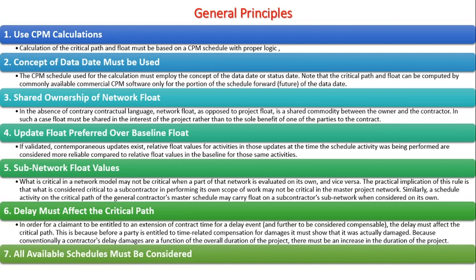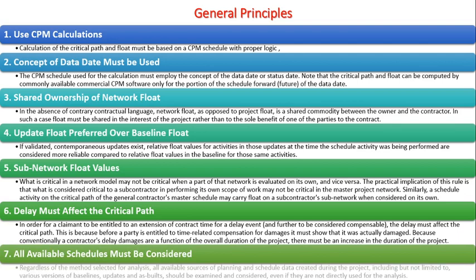7. All available schedules must be considered. Regardless of the method selected for analysis, all available sources of planning and schedule data created during the project, including but not limited to various versions of baselines, updates and as-builts, should be examined and considered, even if they are not directly used for the analysis.